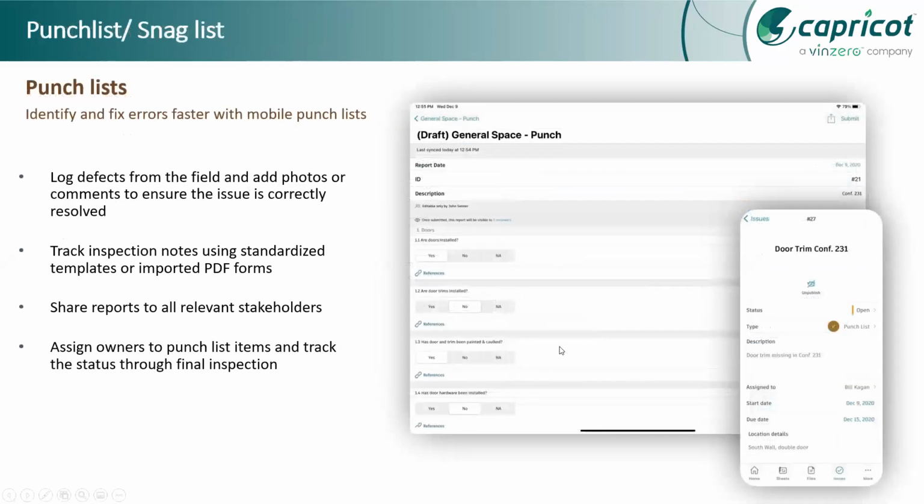If we discuss the punch list, punch lists are another key element for quality assurance in construction. They are used to record any work which is not done yet, or maybe not done properly. If we see today in construction sites, mostly punch lists are prepared using spreadsheet tools like Excel, and they are just printed off and used at the site. So people from the site are using that printout sheet to fill. These printout sheets can be lost or not updated every time a query or issue arises.